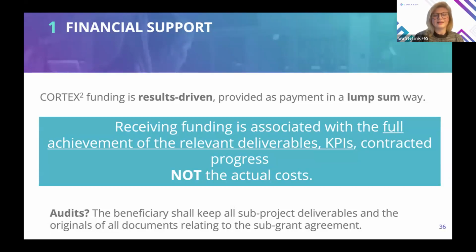You will be paid against successful implementation of the required deliverables and KPIs at each of the contracted phases. So you will always be paid at the end of each phase, considering that all the required deliverables and KPIs were successfully submitted on time and successfully verified by our internal evaluators.